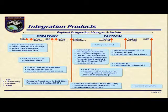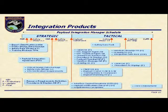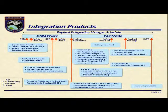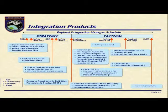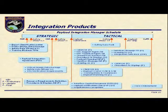This is a high-level overview of what would be included in the Payload Integration Manager schedule. In the strategic time frame, we do assign some PIMs, usually for external payloads that need a longer lead time. In the tactical time frame, the schedule lists all the data set requirements, the agreements we need to complete, safety milestones, and individual vehicle integration requirements.